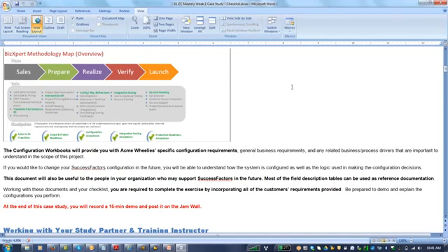Once it is signed off, we go on to the next phase, the realization phase, wherein whatever is in the configuration workbook, we configure in the provisioning and also in the instance. Typically an implementation will have a certified professional services consultant who has provisioning system access. He will enable all the switches or whatever functionality is needed by the business, in sync with them first.